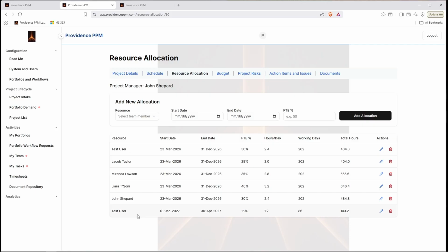And what it allows you to do is set allocations based on a time period. Let's say, particularly for a new product development project, our R&D folks are going to be heavily allocated at the start of the project, but less so as the project progresses into our design transfer and our validations and our launch and things like that.